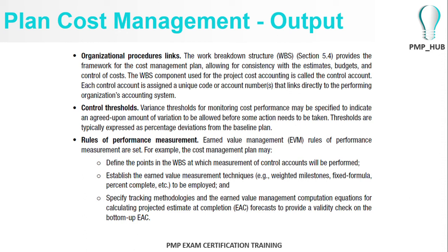Maybe your project has a cost overrun of $50,000: $10,000 from training, and $20,000 from food expenses for the entire development team, and the development team effort, so that you can actually find the root cause properly. Hope you got it there. So you can have control accounts at each and every level, and it's for tracking your expenses. Got it?